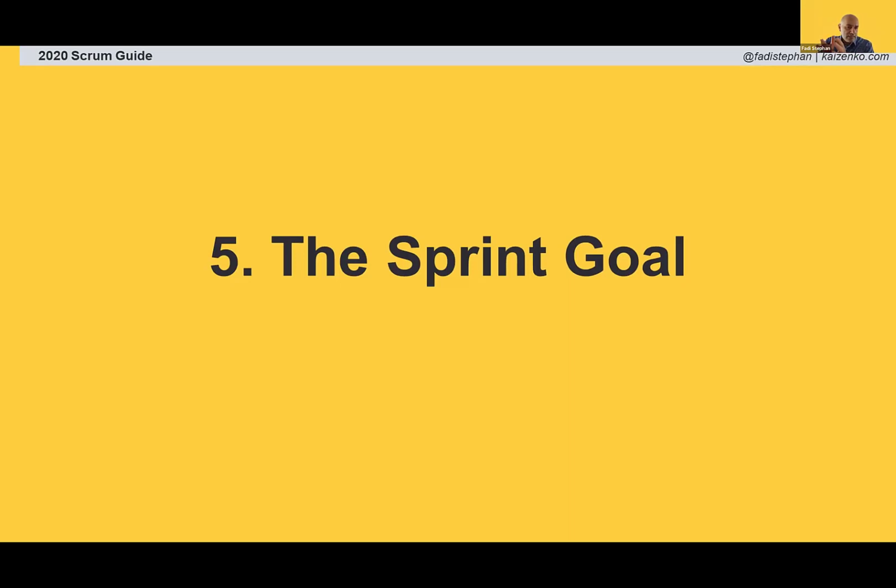And this follows nicely with the daily scrums. The daily scrums become about progress being made towards the sprint goal. What progress are we making towards the sprint goal, not the individual tasks that are in our sprint backlog. Important clarification in the 2020 Scrum Guide.